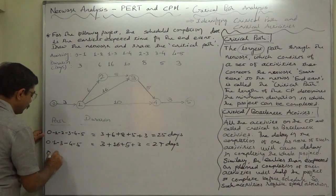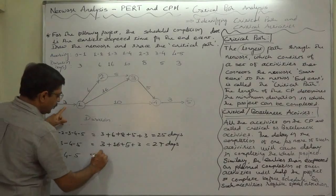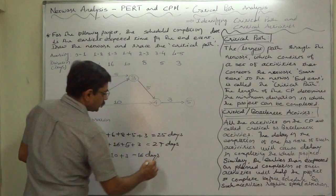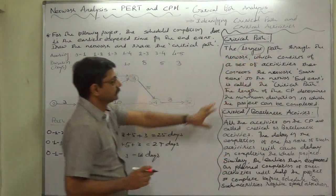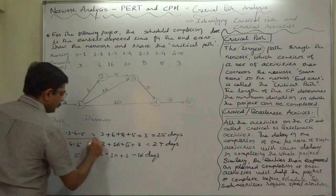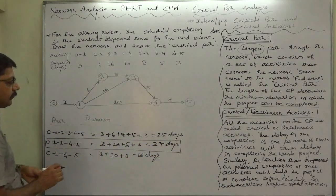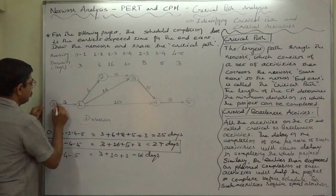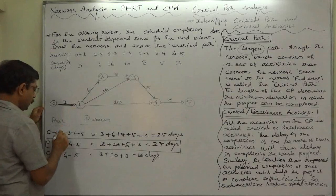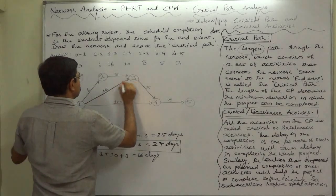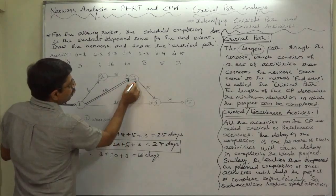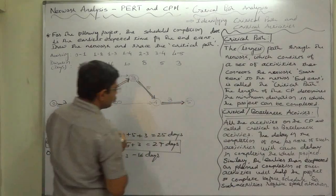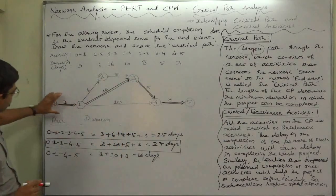The third possible path is 0 → 1 → 4 → 5, which takes 3 + 10 + 3 = 16 days. The longest path, taking the highest number of days to reach the end event from the start event, is 0 → 1 → 3 → 4 → 5, which takes 27 days. According to the definition, this is the critical path.